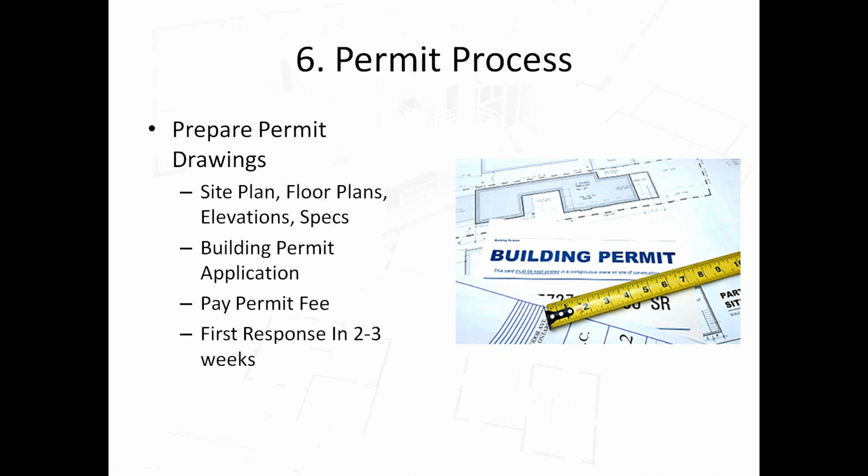The reason for that is, even though you're not adding anything if you're putting in a basement suite, there are typically additional requirements for secondary suites, such as parking, which can interfere with the neighboring property line, or new windows. If the new windows are within 4 feet of the property line, there are fire issues and in some cases bylaw issues, and that's why they want a site plan.